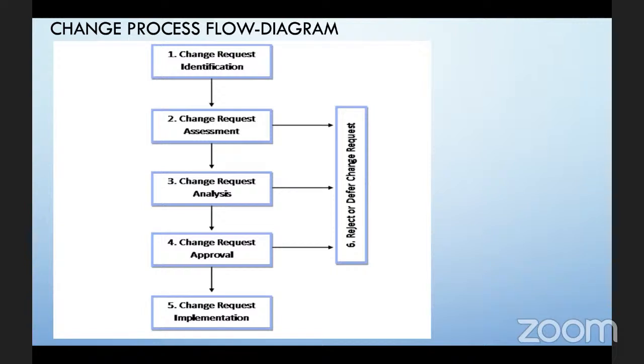That's number two here. And of course, on the right side, you guys see there's something out there: reject or defer change request. So at this number two stage, you could either reject it or defer it, right? Once we look at the assessment, we could promote it to change request analysis, and then change request approval. In all three steps, two, three, and four, we could still reject it or defer it. And then finally, we can approve it and say, okay, let's go ahead and implement the change that we want, right? Very important.